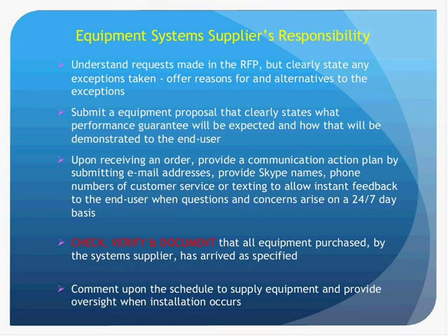For example, the supplier should understand what the RFP contains. If there are any questions, they should ask them. Clearly state if there are any exceptions to what was requested in the RFP. If an exception is taken, provide an alternative option. The request for proposal may include a performance guarantee, and if so, the supplier should identify how that will be verified in the field.